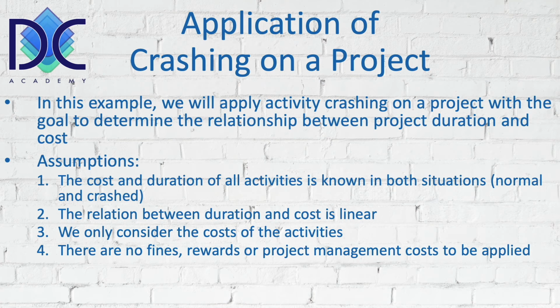The relationship between duration and cost is linear. When we look at the crash cost, the relationship between the time duration of an activity and its cost is a linear relationship. It's not necessarily true in reality. We could make different models, but we keep it simple here and just assume that this is linear. And I'm convinced that in most of the possibilities that we have, except in some very special cases, we won't have a problem.